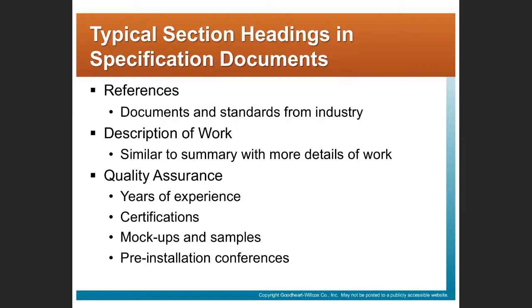Description of the work, and quality assurance. It may say something like, all electricians shall have this particular certification. It may say you have to provide a mock-up or something to be approved. Certainly if you're doing finish work, you might have samples and mock-ups that have to be done and be approved by the architect.